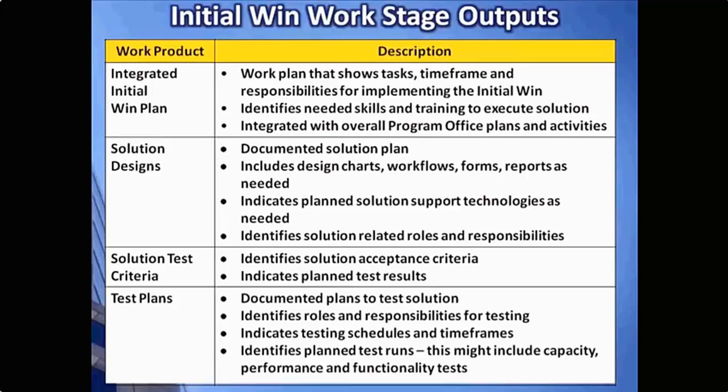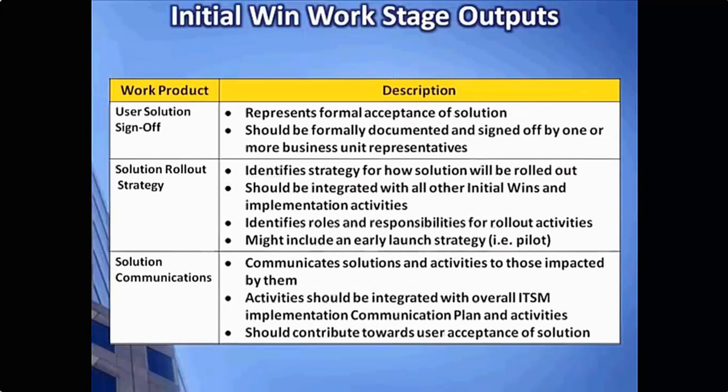We have an integrated initial work plan in terms of how we're going to execute this. Solution designs, which will be output from the design efforts. Test criteria for how we're going to test this, test plans. Maybe a sign-off from your stakeholders or users that will be using this. A rollout strategy for how this will be moved and transitioned into production. And a communications plan in terms of how we will communicate this solution, especially if it involves training or other types of changes or new skills that people need to have in order to work with it.